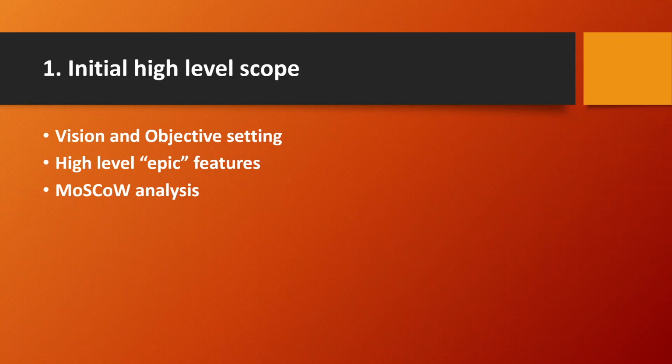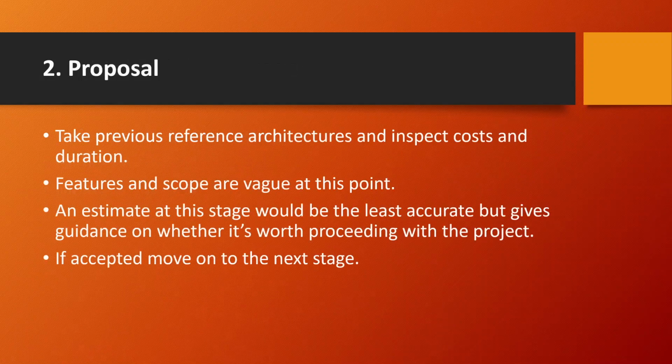And finally, the W, the won't features could well be important one day far in the future, but are out of the scope for the current project. And identifying these is very important because knowing what not to focus on is highly helpful in building the MVP.